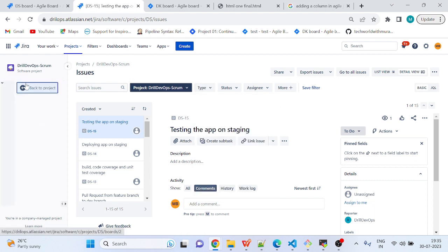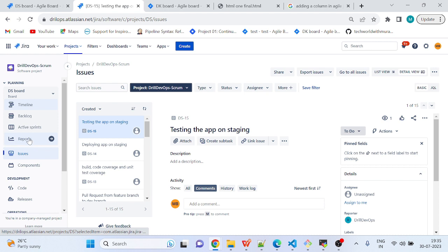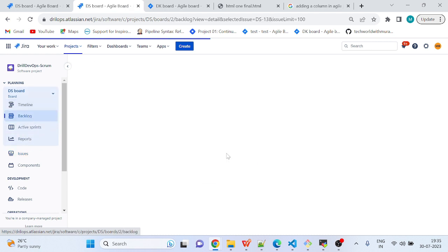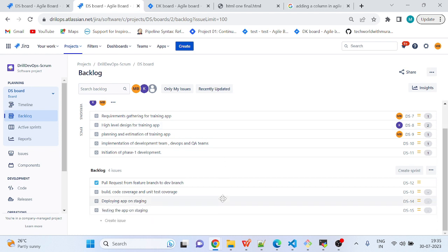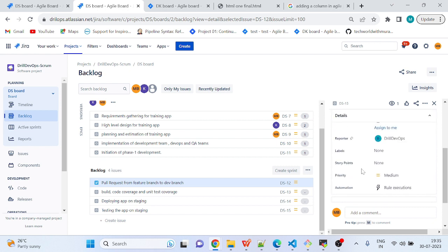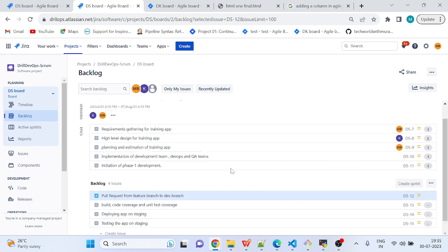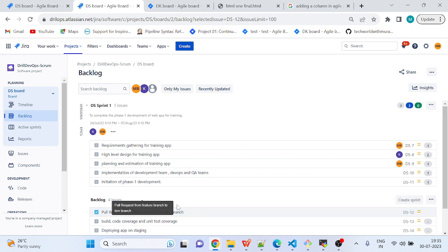And if you see backlogs, we have talked about two types of backlogs, product backlog and sprint backlog. If you see, I have a product backlog of four items, where these can be given some priority, medium, high, low, like that. Based on this priority, people start taking them during the sprint planning meeting. Whenever they start sprint planning, they can just drag it and put it here as